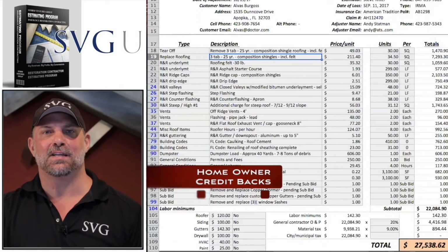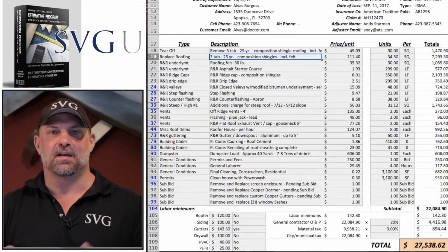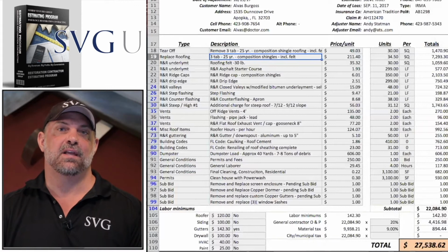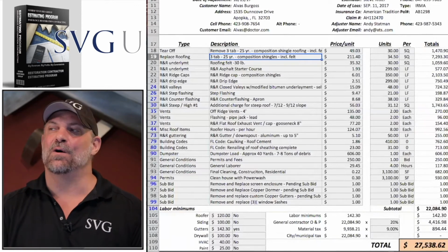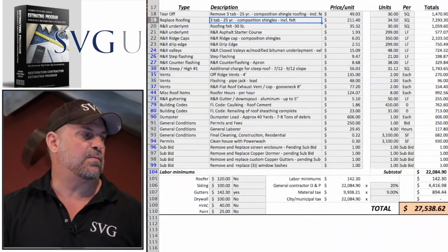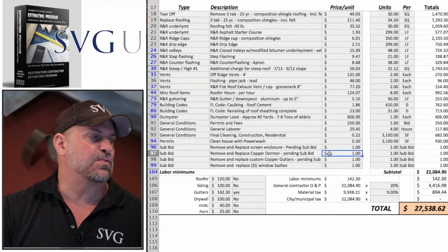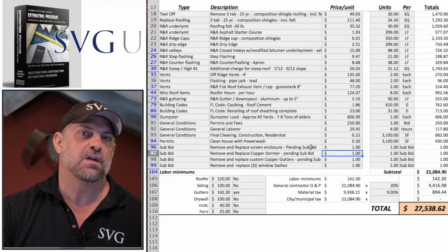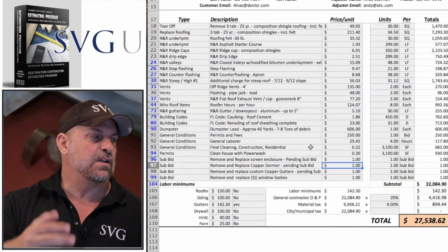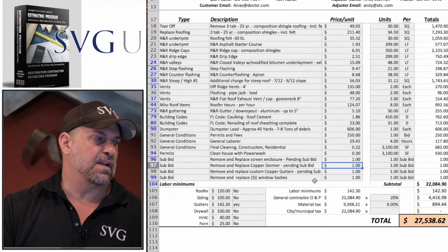Look, if you're not going to do them, it doesn't make a lot of sense to spend hours on the inside of a house measuring a floor and getting sub bids to override the Xactimate, unless you're actually doing the work, right? So by putting it in there on your prime estimate to begin with, we're showing that we're acting as a general contractor, and we're also remembering that those trades are part of our scope of damage. Typically, the adjuster, when he goes there, is going to measure the inside and put all that kind of stuff in Xactimate.